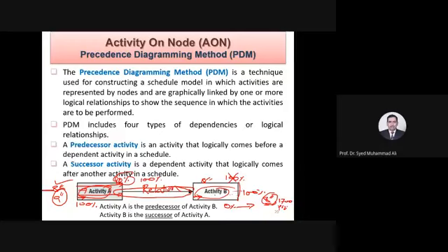صرف پرابلم یہ آ جائے گا کہ اب آپ کو 9 انچ کا آرڈر دینا ہوگا اور اب آپ کا پروجیکٹ اس میں ڈیلے ہو جائے گا. یہاں پہ اگر آپ کو سلیک نہ ہوا، یہ کرٹیکل بات ہو، آپ کا پورا پروجیکٹ ڈیلے ہو جائے، وہ رسک ہے. لیکن وہ رسک آپ نے کیلکولیٹڈ لے لیا، آپ نے ایکچوئل پلاننگ کر لی کہ جی میں ایکٹیویٹی